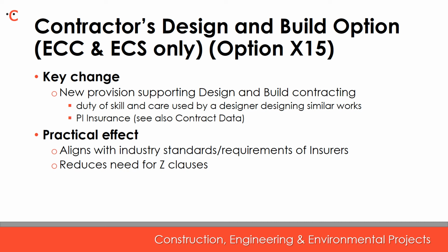Option X15 refers to reasonable skill and care to ensure design complies with works information. Therefore, NEC3 was often amended by way of Z-clause to deal with duty of care and add more familiar drafting, for example, the duty of skill and care used by a designer designing similar works, etc. In NEC4, a new secondary option supporting design and build contracting has been introduced. New option X15 includes the following three features.